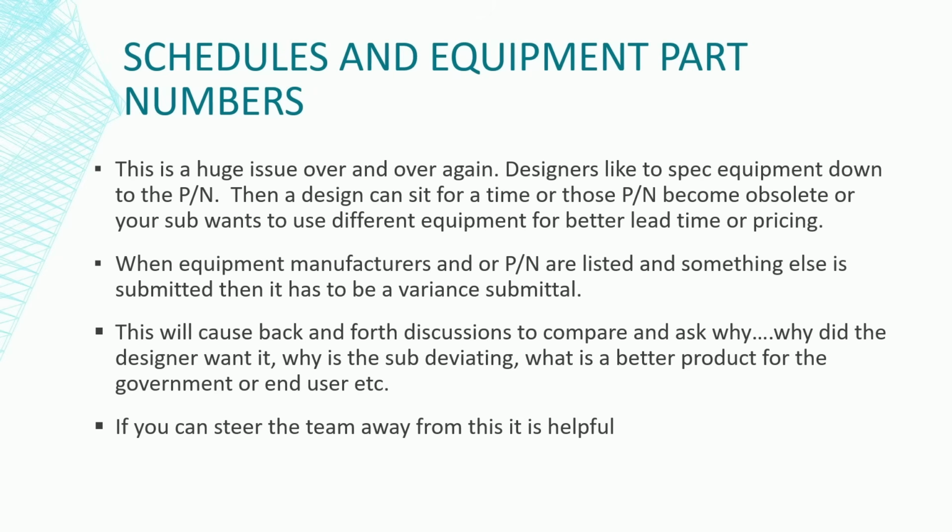So when you're at this design table, if you can steer the team away from manufacturers and part numbers, it's going to help. Still meet the CFM, still meet the electrical requirements, still meet all the spec requirements, all the RPA requirements, but just don't pigeonhole us to a manufacturer or a part number. So at that table, try really hard to politically steer them away, because it's going to be time and money for you and the design team with the back-and-forth, the explanation, and reviewing those submittals.